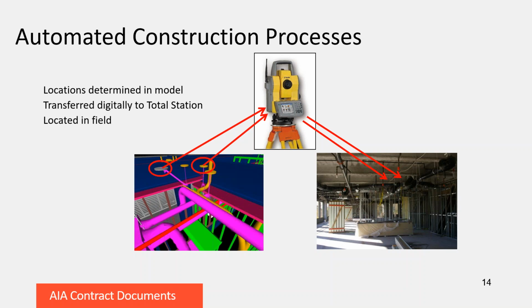This process is hugely efficient and effective. DPR did it on the UCSF Medical Center some years ago and laid out over 200,000 anchors with 43 of them in the wrong place. That's a 0.02% error rate, and I don't think you're going to get that in any kind of manual process. It was also 4 times as fast and about a quarter of the cost.